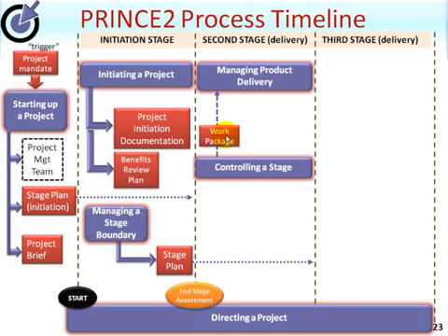But amongst the other information will be how often the project manager wants a report on the progress of the products being created in each work package, and this is called a checkpoint report. Typically this will occur weekly, but it may be some other time period. It may be a written report or it may be a face-to-face meeting.